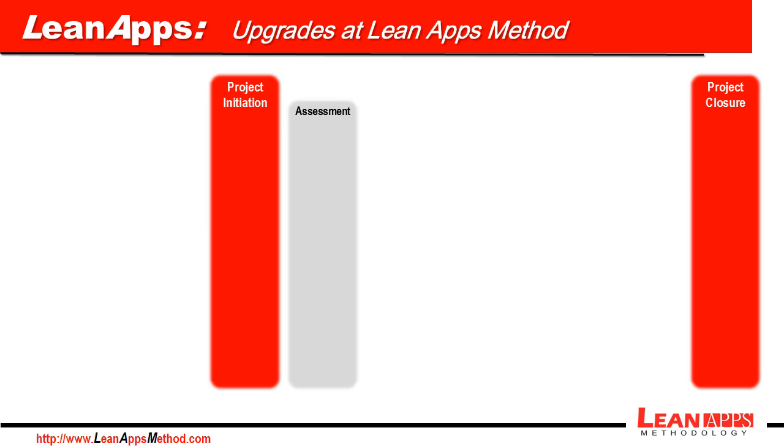CRP1 should not contain specific setups addressed to the client. It should be a fast phase in order to prioritize the approved gap list and to define system setups.